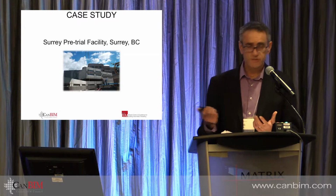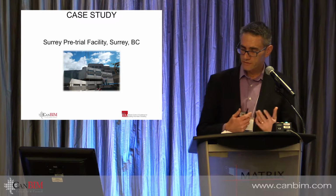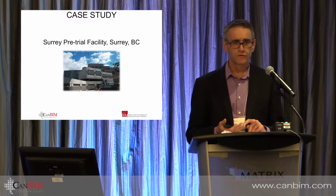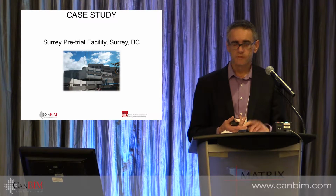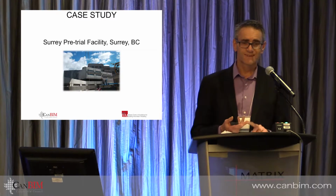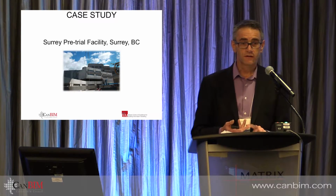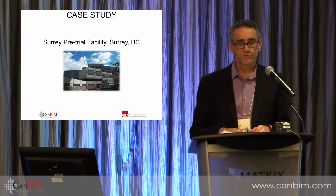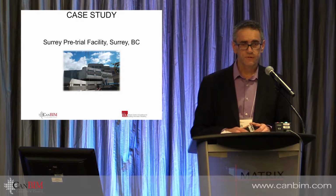So those prison cells, one you can see on the hoist there, on the crane there, sorry, is 2 prison cells. They come fully finished, they're painted, the door is on, the security's on, the window is on, the toilet is mounted, the sink is mounted, the bed is mounted to the wall. I don't think they shipped them with the mattress, but they probably could have done. These things just came from the factory that way. And we were able to install 258 prison cells in 12 days.